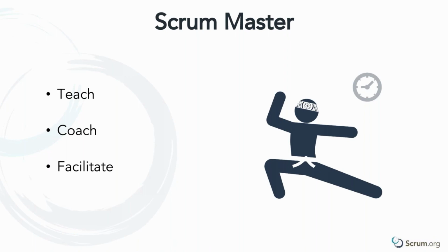Part of the Scrum Master's job is to also put up a shield around the team to help the team remain focused. So if people from outside the team are coming to an individual asking them to do something that's not part of what's planned in that sprint, the Scrum Master's role is to shield them off and to handle that, maybe through them or the product owner, who we'll talk about in a moment.